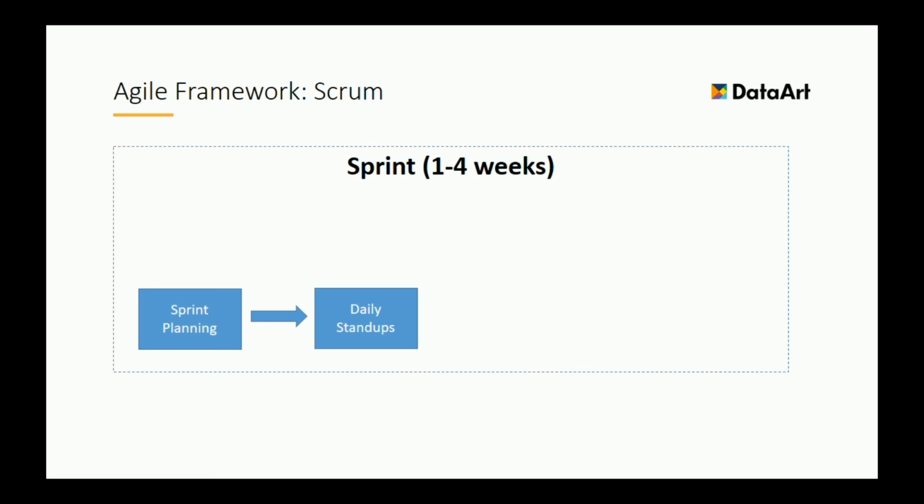It's very short. Actually, Scrum is all about time boxing, which means that every event can last no longer than a defined period of time. In terms of daily stand-ups, it's standard for 15 minutes. In terms of sprint length, it's up to the team to decide, 1 to 4 weeks. So daily stand-ups are performed every day of a sprint from its beginning towards its end.